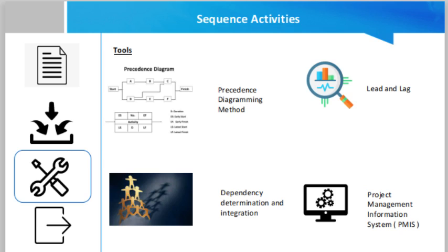Now, the leads and lags. In certain cases, an activity may get a jump start before another, or may incur a waiting period in between other activities. These situations are referred to as leads and lags. Leads occur when particular activities offer the required resources to begin a dependent activity, but are not quite finished. For example, a music event requires the tracks to be decided before recruiting a DJ.